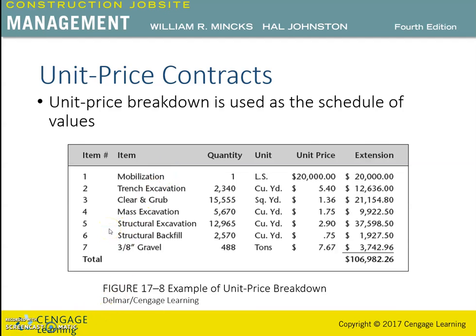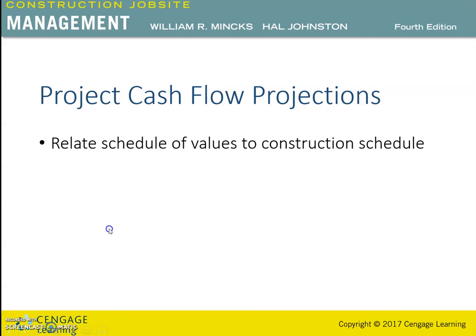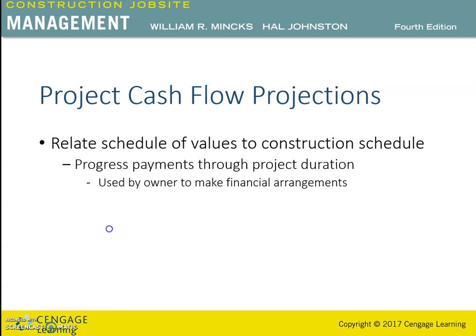Now let's look at the project cash flow projections. Project cash flow projections relate the schedule of values to the construction schedule, projecting the progress payments through the duration of the project. The cash flow projection approximates the progress payments for each payment period during the construction contract.